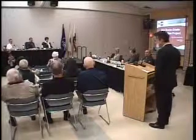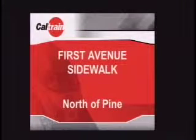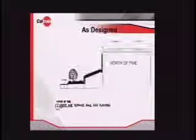So I'm just going to give a very brief update on the sidewalk at First and Pine, and then I've got one decision for the council regarding the sidewalk further up on First Avenue. At First Avenue at Pine, this is the area between Melody Toyota and Pine Street on top of the existing box culvert. It was designed with a 6-foot sidewalk adjacent to the curb, then a planter strip, and then the raised planter that you see going in now. However, there was a conflict with the box culvert.